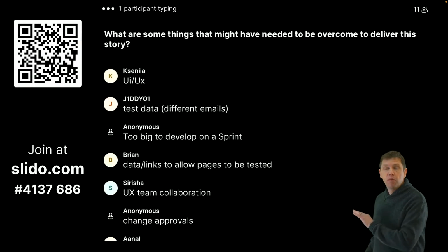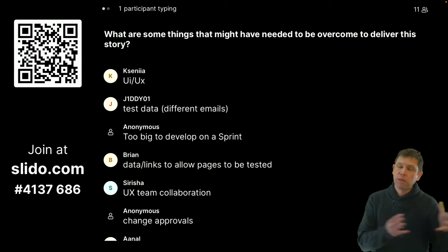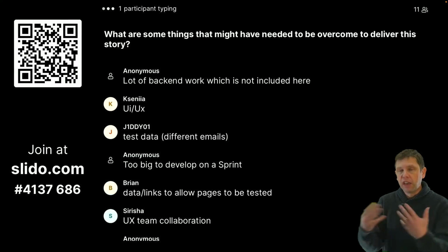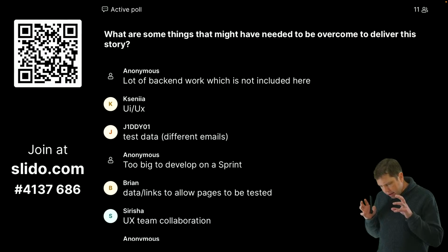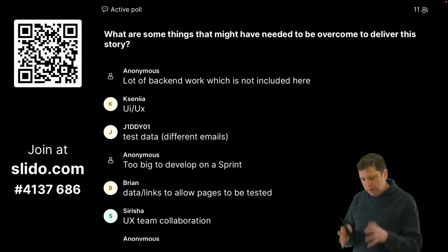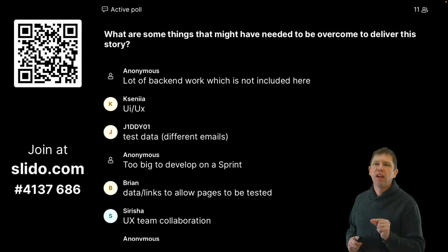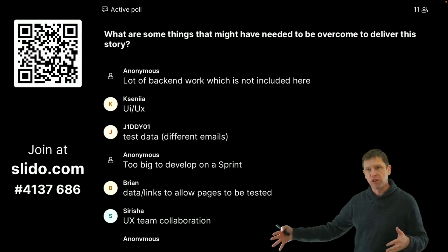We may get into this and decide that working on email first is going to take us 6 weeks to get worked out. Let's put this back on the back burner because we can't deliver that. Get the process started and then go ahead and start working on something else. It may sound insignificant, but teams I've seen that take this really, really small, so small it seems stupid approach are much more successful than the teams that try to get 2 weeks worth of work and then they get to the end and discover that there's barriers.